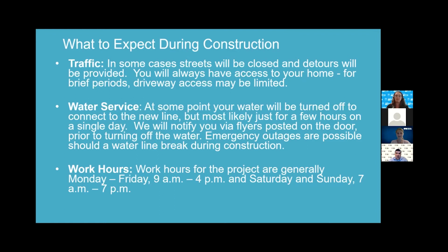Another item is water service during construction. There will be instances when your water will be turned off in order to connect your service to the new water line. When this occurs, it will most likely be just for a few hours on a single day, but we will notify you with flyers posted on your door prior to turning the water off. And of course, emergency outages are possible if there are water line breaks during construction, which should be noted.